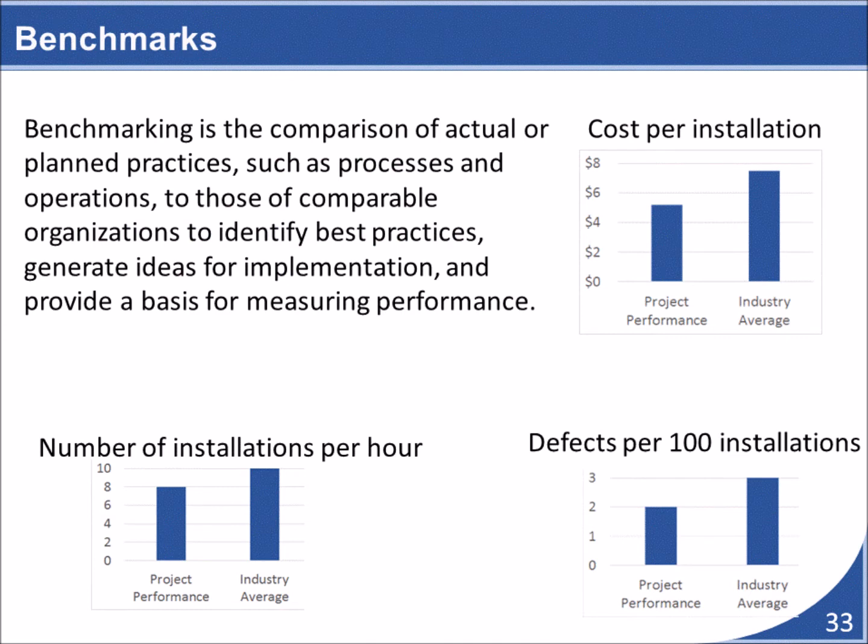While project metrics are very useful, they need to be realistic. Benchmarking offers a way to compare what is happening on your project to what is normal within the industry. For example, before deciding that all supply costs should be within 10% of the original estimate, you should see if this is realistic and normal within the industry. You can examine industry trends to see what is occurring on other projects, and in doing so, you can determine if your expectations for this project are reasonable or not.